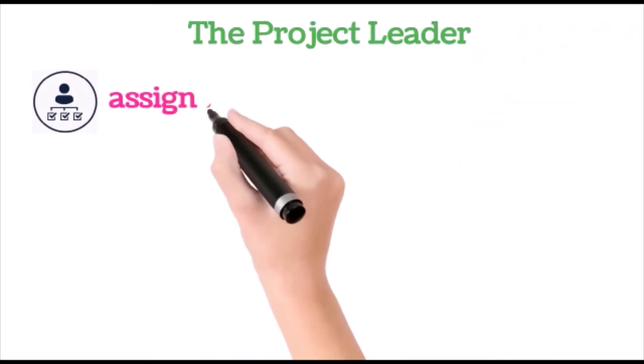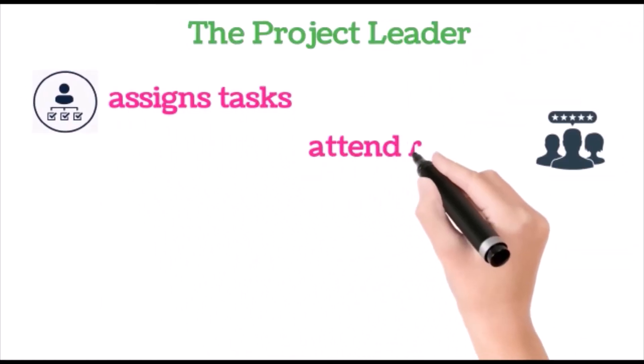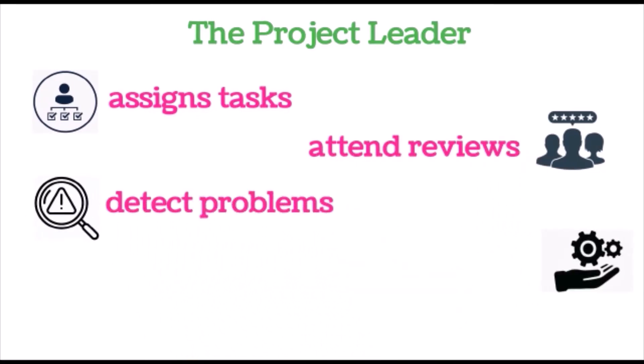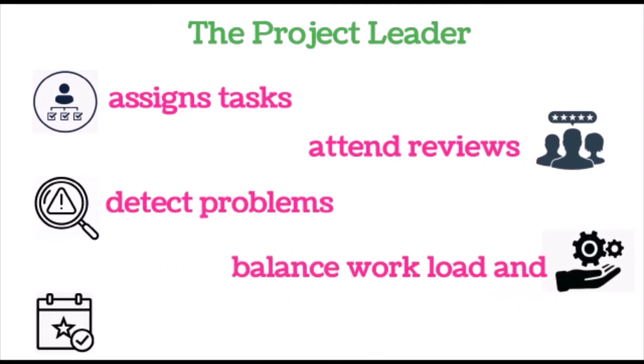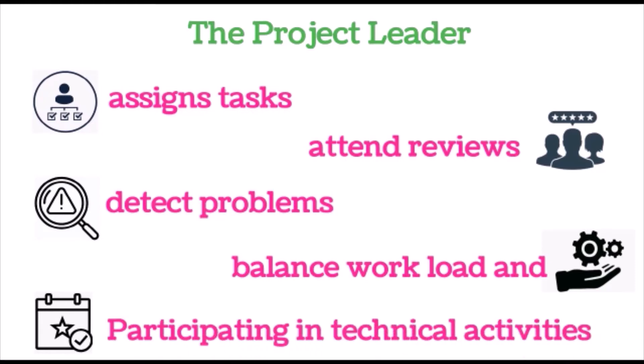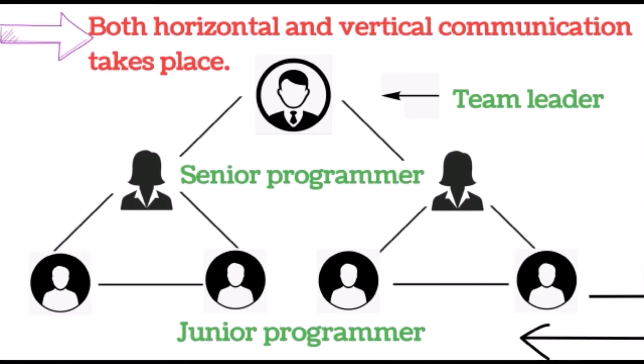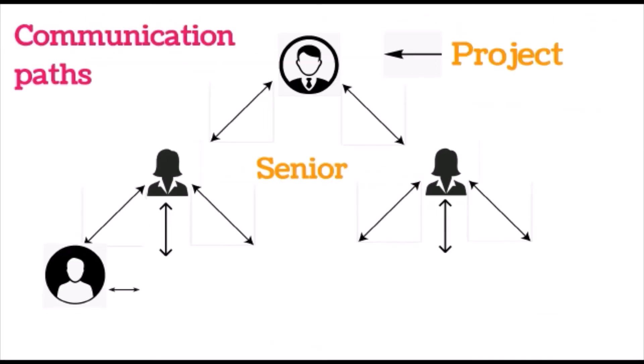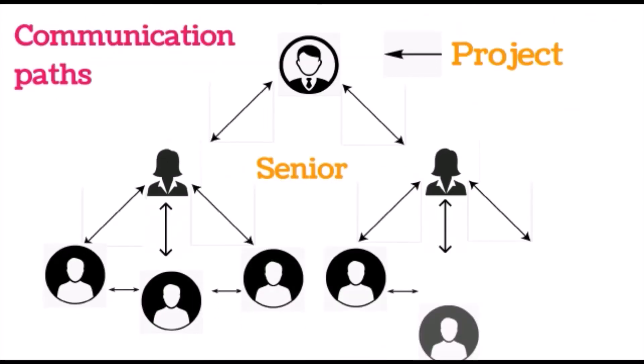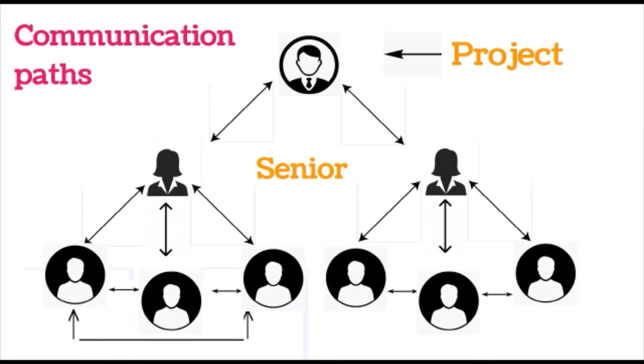The project leader assigns tasks, attends reviews, detects problems, balances workload, and participates in technical activities. Here senior programmers work under a team leader and junior programmers work under senior programmers. It requires both horizontal and vertical communications.